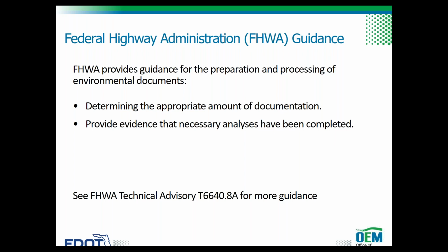The results of location hydraulic studies are documented in the Location Hydraulics Report. The Location Hydraulics Report must be reviewed by the District Drainage Engineer to verify that all base floodplains are identified in the Location Hydraulics Report and are consistent with existing base and floodplain management programs. The results of the location hydraulic studies are briefly summarized in the environmental document and considered when making the NEPA decision.